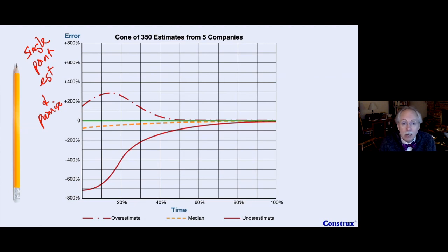That might happen. What I would suggest is to say, you know what, I'm uncomfortable making a promise there. In fact, I will not commit to any point in that range because it's unknown. What I will do is take that as a planning number, my next kind of estimate, and we'll work on helping to come up with a better commitment as we go forward. Now, you can force me into that, but I will continue to give you updated, true information about how this project is running, and I will try to control it by changing scope, by changing budget, doing other things that might be in my power to hit whatever number you've come up with.